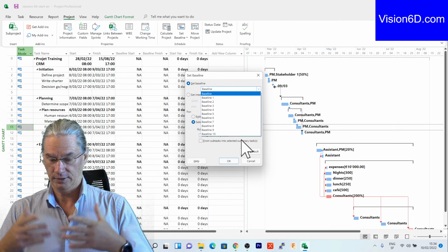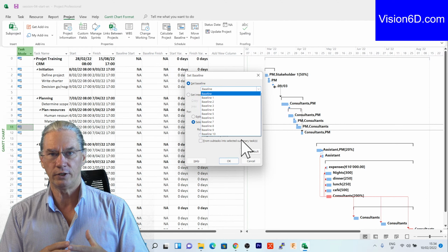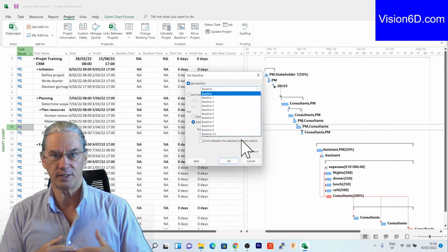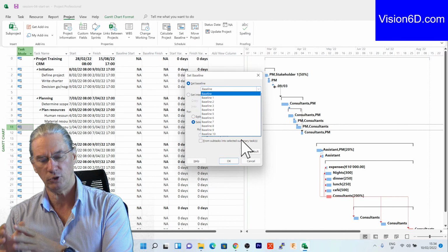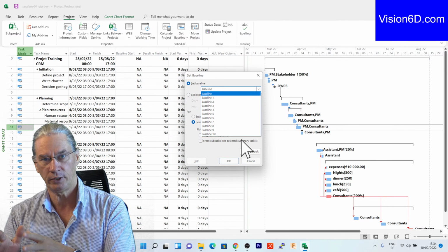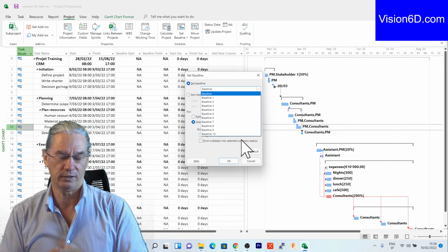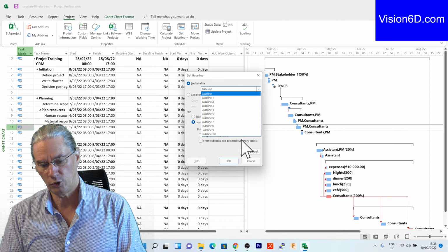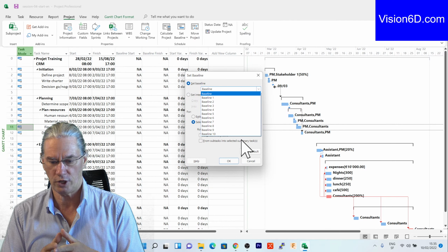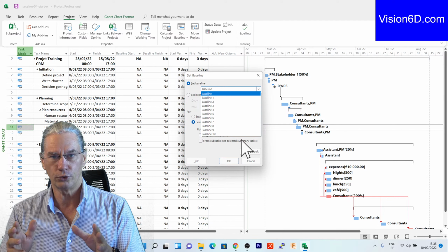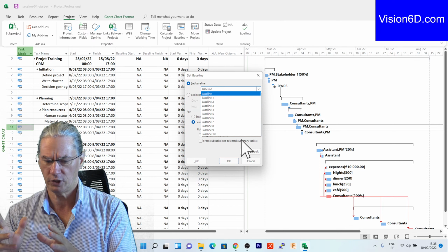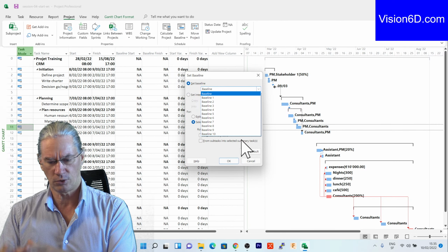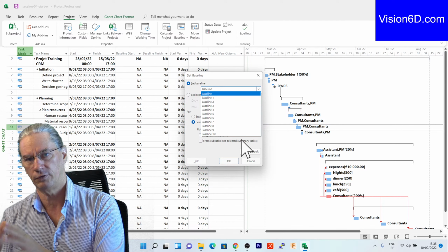The good habit is then to archive the earliest baseline. Like that, whenever you are at one point in time, you can always come and compare to that initial baseline, for example. It could be you have a customer that wants an important change in the project. You all agree, your team thinks it's a really good idea. It will cost more, but the customer agrees on that. So you redo the baselining of the project.